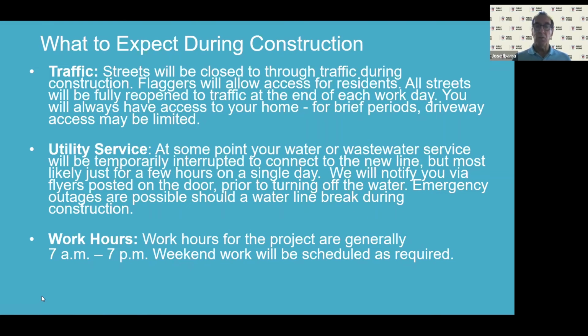Regarding traffic, the streets will be closed to through traffic during all the time of construction, but all the local traffic will be allowed. Flaggers will allow access for residents, and all the streets will be fully reopened to traffic at the end of each work day. You may have limited access to your home and your driveway for brief periods if we are working there in front of your house.